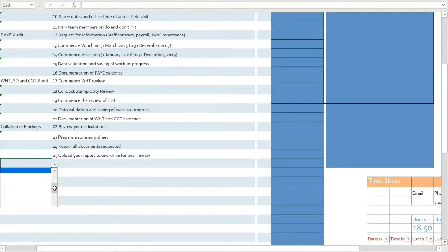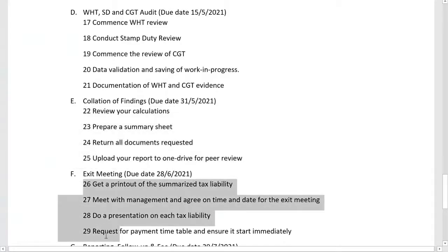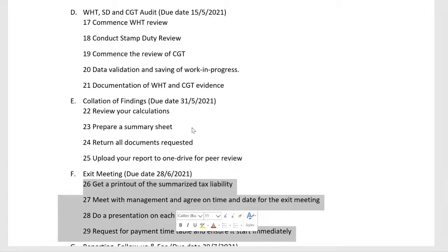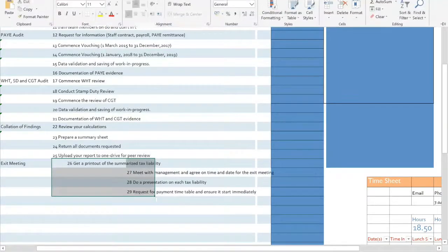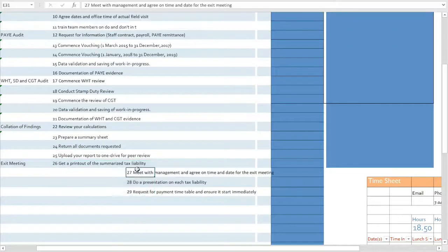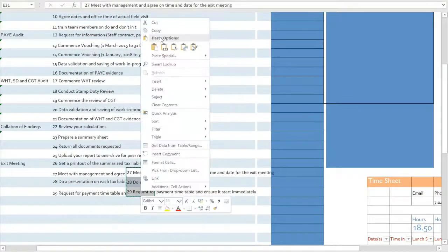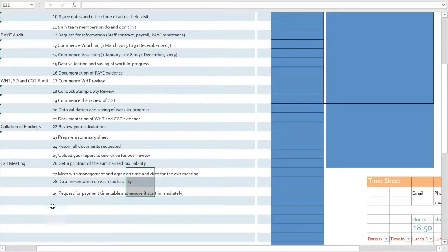Let's move forward and you will see. So we are going ahead to populate each of the milestones. We are trying to populate the sub-activities that are in each of the milestones, because these sub-activities will be the activities we will assign to team members. As they achieve these sub-activities, the milestones are being achieved.